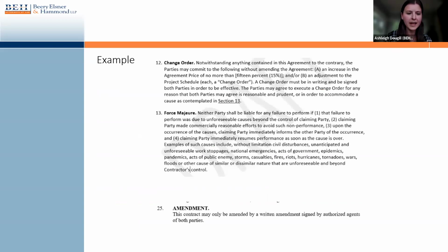So here again is just some sample language to show you what these sections may look like in an agreement. You can see here the amendment language, the catch-all, very simple. It just says that you can only change the language of this contract by written amendment, which is signed by both parties. That is fairly standard.